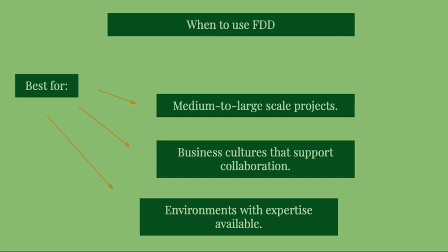So when should we use feature-driven development? It is mostly best for medium to large-scale projects. Feature-driven development allows for parallel development and can accommodate larger teams because different teams can be working on a different feature concurrently.